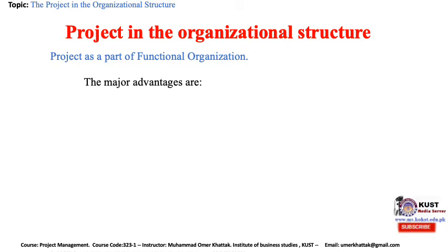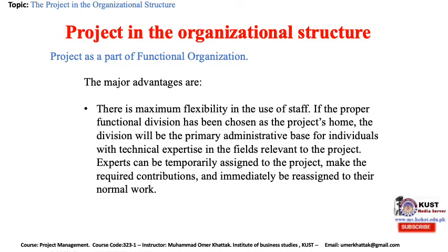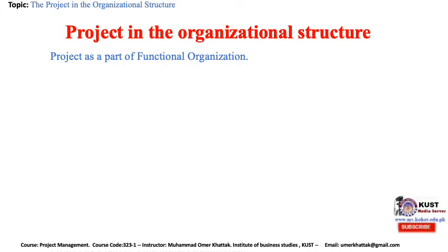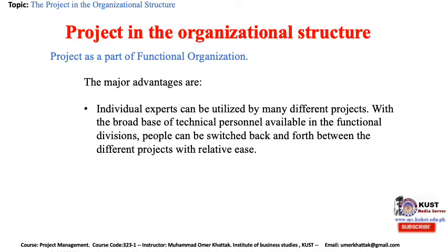The major advantages are: there is maximum flexibility in the use of staff. If the proper functional division has been chosen as the project's home, the division will be the primary administrative base for individuals with technical expertise in the fields relevant to the project. Experts can be temporarily assigned to the project, make the required contribution, and immediately be reassigned to their normal work. Individual experts can be utilized by many different projects.